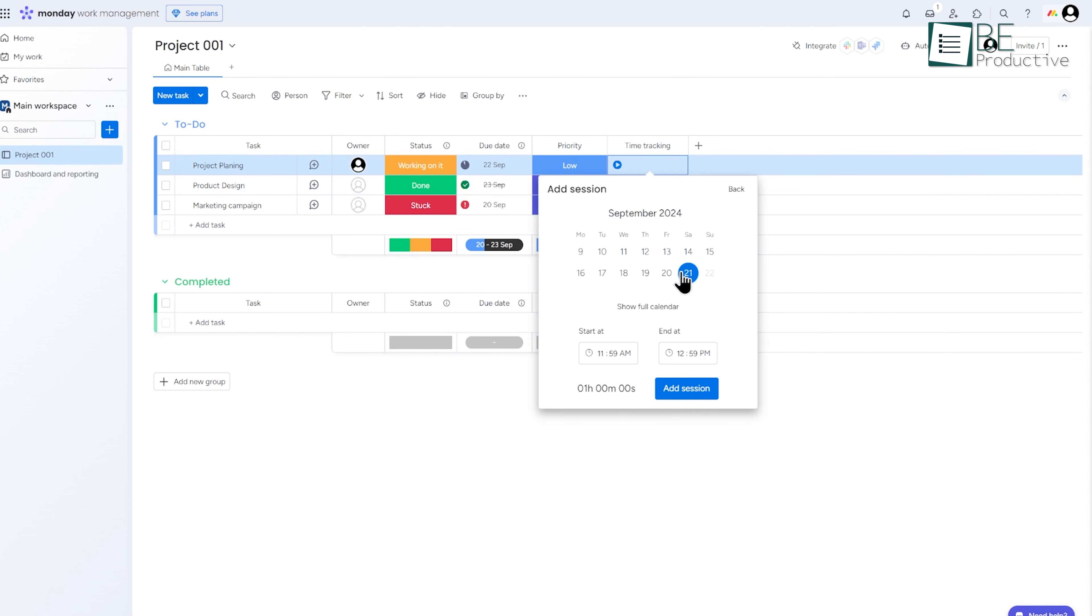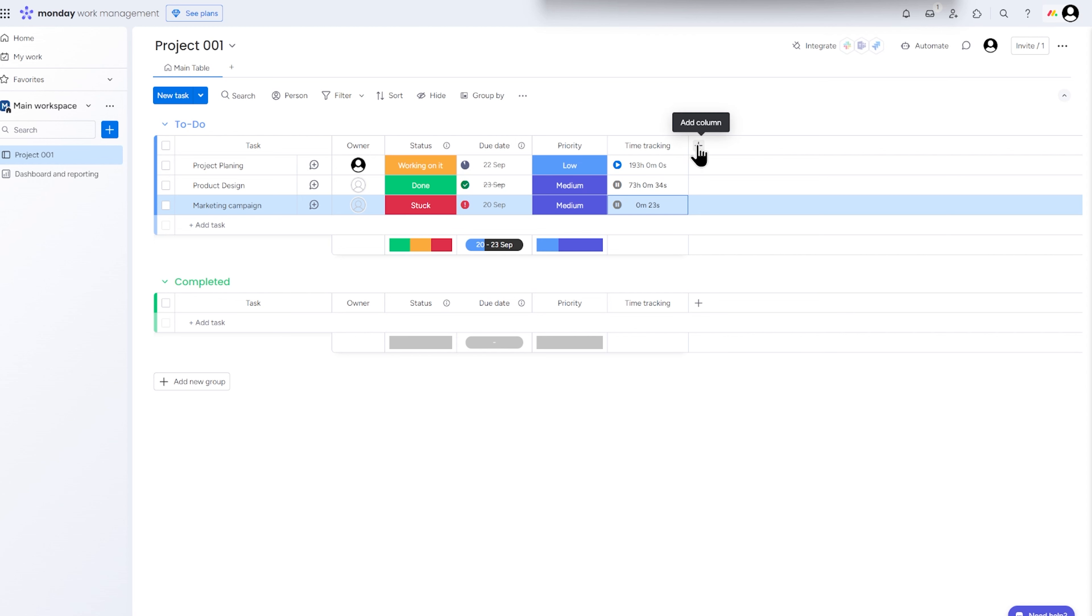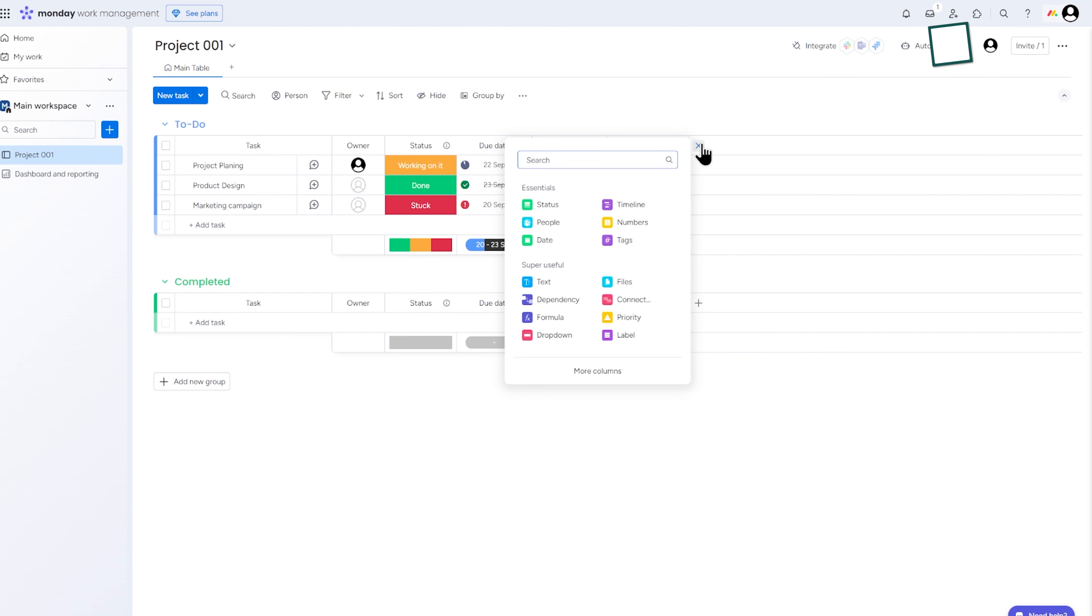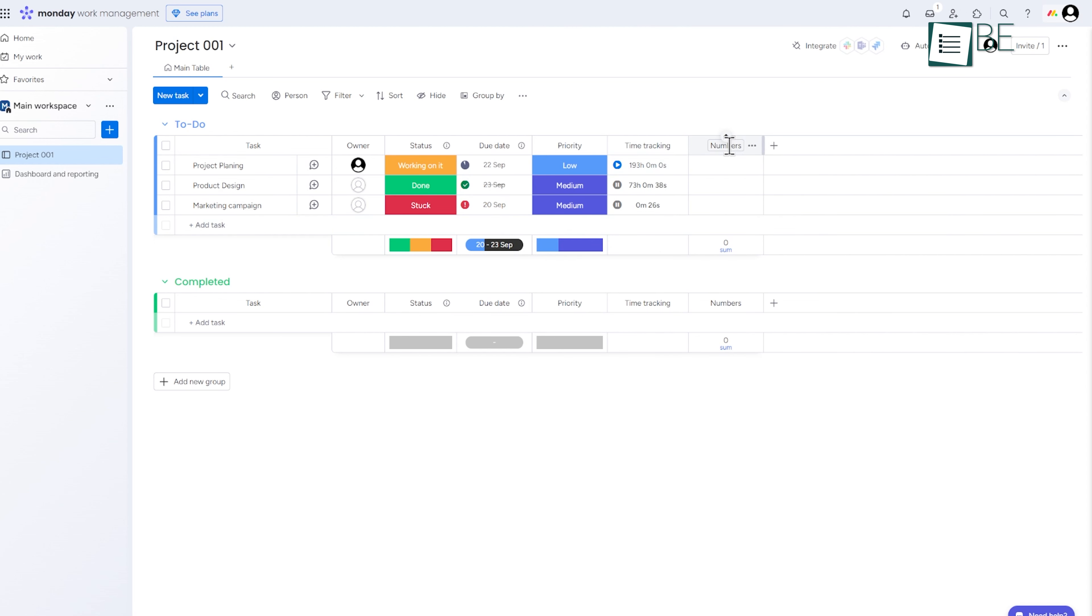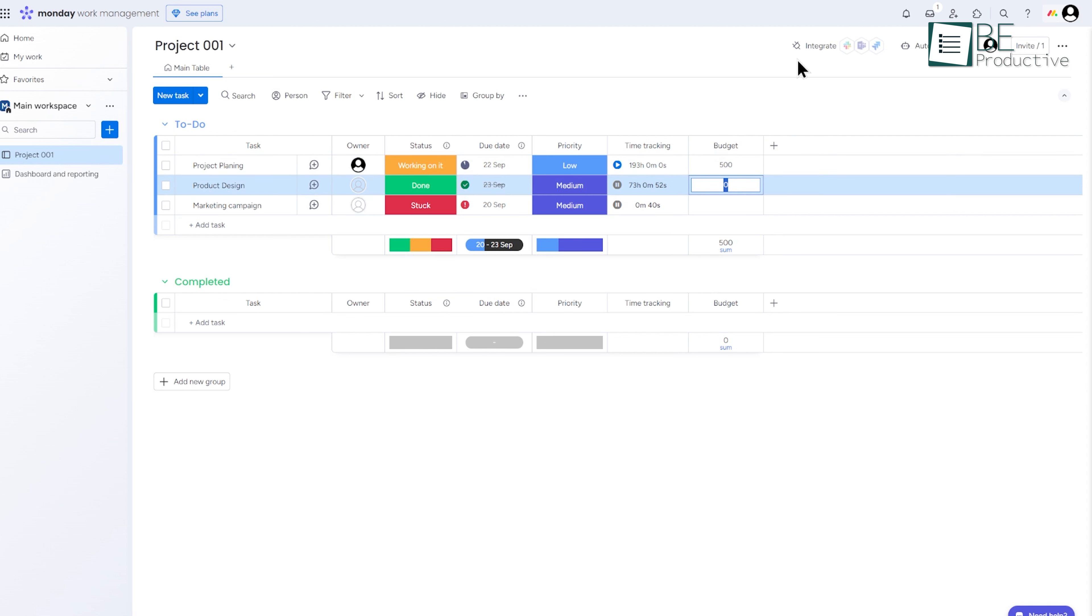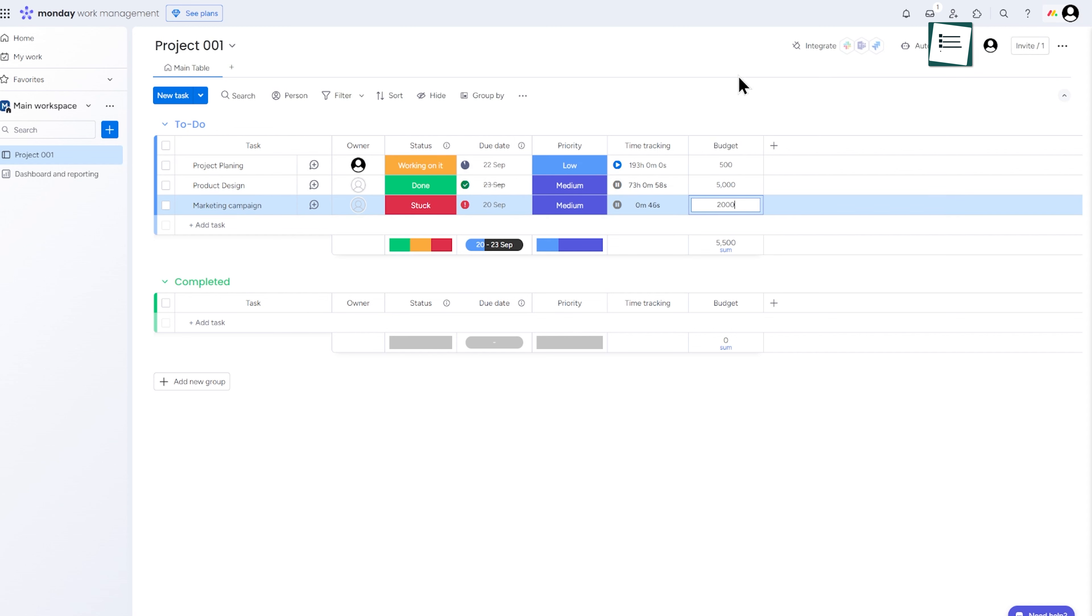For budget management, add a numbers column in the same way and rename it to budget or cost. This lets you track expenses or allocate budget for each task or project. These features are especially useful for businesses that need to stay within tight timelines or budgets, such as marketing agencies or development teams.